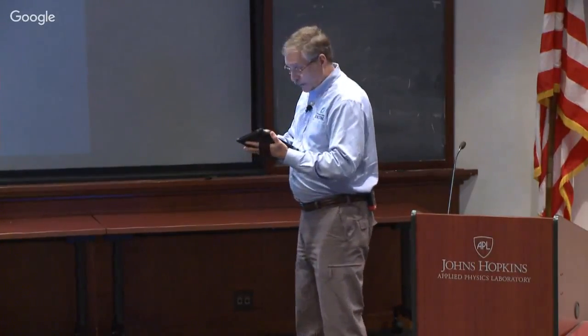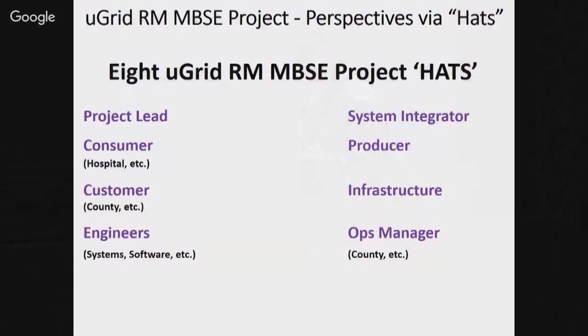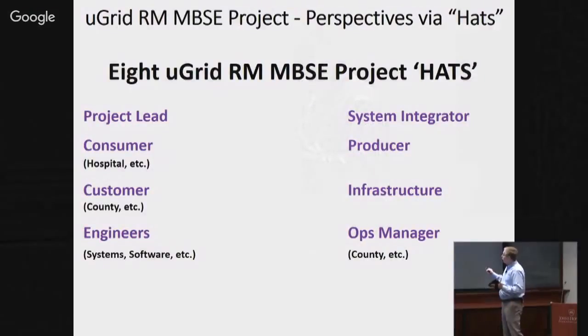So then for this particular project, and if I haven't mentioned it before, I think it's important to mention it now: all of the Lean Startup method, Agile Scrum process steps can be accomplished, at least initially, without any special software tools whatsoever. All of the steps first employ brainstorming, affinity mapping, that is writing on flip charts and whiteboards or on stickies, and then you put those on the whiteboard.